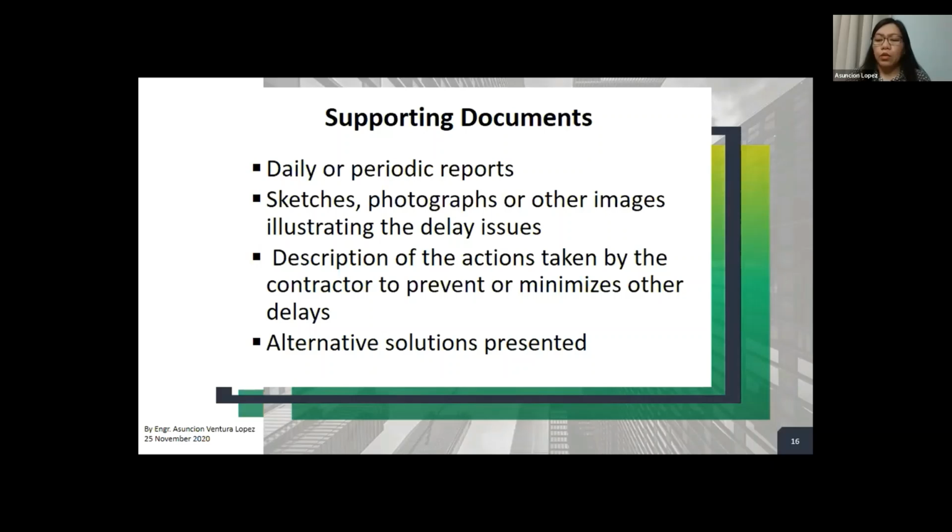This will also show if there are resources that went down or up, or if you need more resources, this will be reflected in your daily report, okay? What else? Sketches, photographs. The photographs, the videos, you should know that they should be taken regularly. Because it is an easy, accurate way of recording the actual conditions that happened on site, how the work had progressed at that period of time.